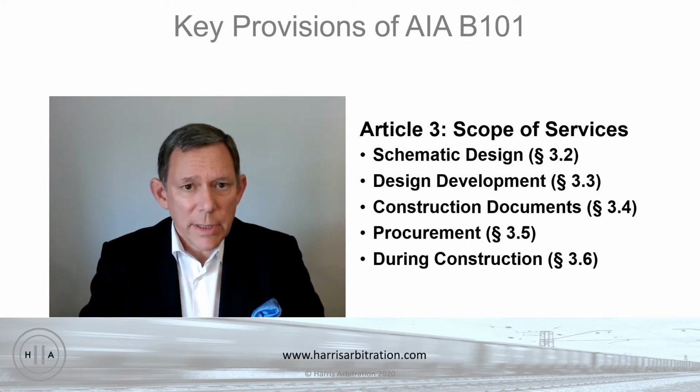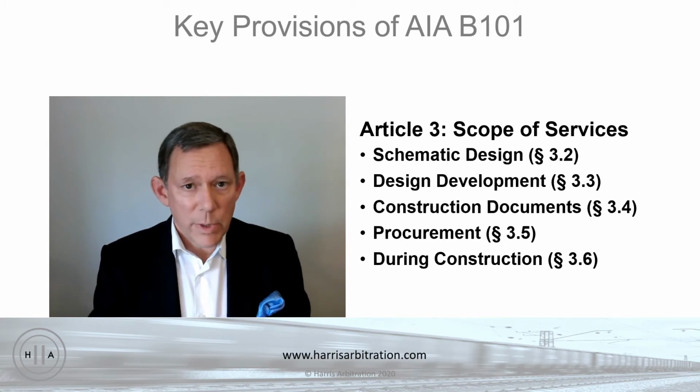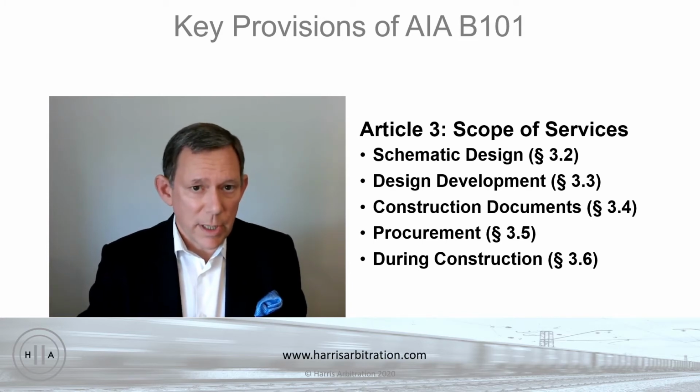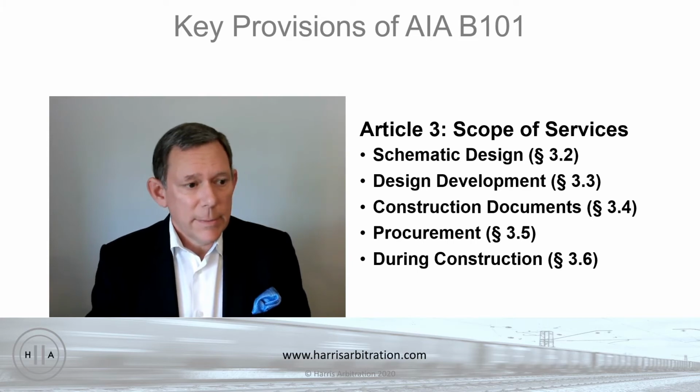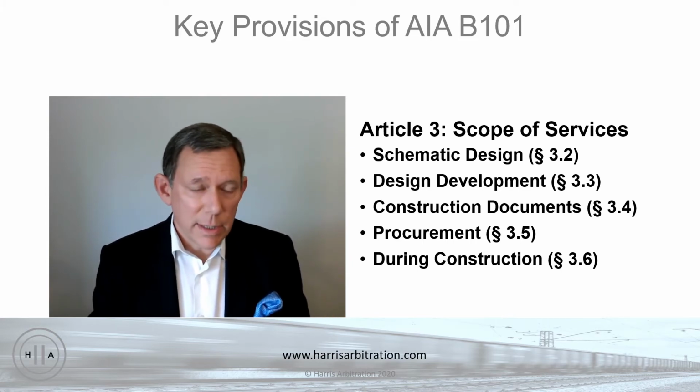The next item in the list of what the architect does is help the owner with the procurement, that is, putting the design documents out to bid in a competitive bidding process. Because, as I said, this is the foundational agreement between the owner and architect in a design, bid, build project delivery method. What that means is first you have the design, then once that's complete, and we all know what it is that the contractors are supposed to be bidding on, those drawings can be put out to bid to different contractors who then all know, okay, we're building a Cadillac, and it's going to have a V8, and it's got 4 wheels of X size, and it's got this and that.